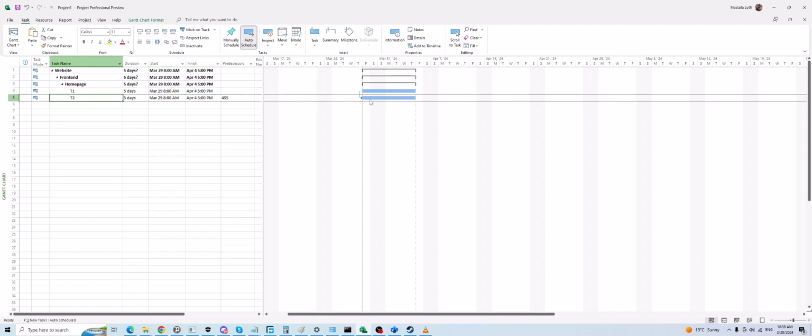task T2 can, I emphasize here, can start as soon as the predecessor, which is T1 here, starts working. I said can, because it's very important for you to understand. Task T2 cannot start until task T1 starts working. You may try to link like this. Let me change the start to start.